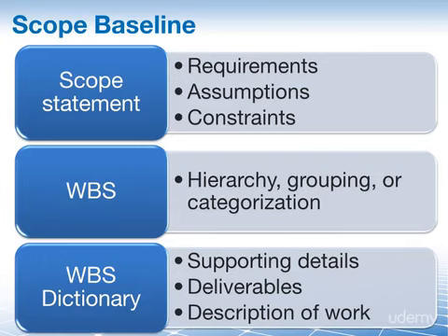The information in the work breakdown structure and supporting work breakdown structure dictionary will give you some indication of how and when activities are happening for your budgeting process. In a nutshell, the scope baseline provides the information on what work is to be undertaken within this project. You need to know this in order to be able to determine the budget.